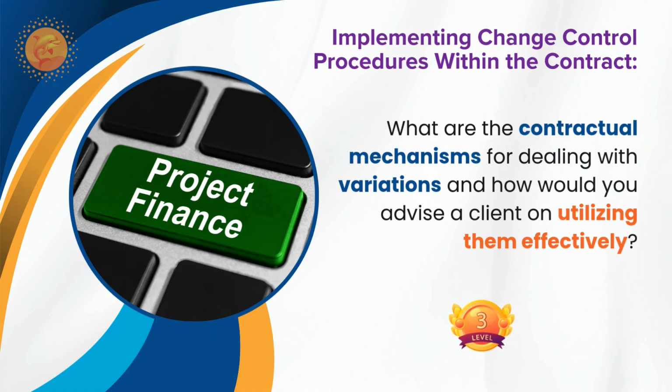So how these things are done, you cannot rely on everything from the FIDIC itself. FIDIC won't give you detailed timelines for each and every activity. That one we will define as the project protocol in the initial stage. That is the responsibility of the contract administrator, whoever takes that responsibility, usually quantity surveyors. So we have to get these things agreed initially.